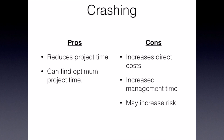To summarize: crashing certainly reduces overall project time and can be very useful in finding an optimum project time, especially when we consider deadlines, incentives, and indirect costs. The drawbacks are that it will always increase direct costs, increase the amount of time spent on management since we'll have more resources and people to coordinate, and therefore may also increase risk. Crashing is something we definitely want to consider as a project manager — we want to present all the options to our stakeholders. However, just because we can crash something does not necessarily mean we will crash it. We need to consider the bigger picture of our project.